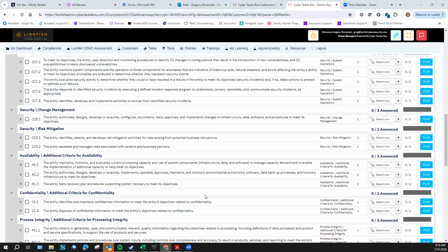So that is a lot of paperwork that goes into this, where you have to invite people to the change control meeting. You have to have the change control meeting. You have to go over the change controls. You have to have them approved. You have to schedule them. And then you might even have to communicate out to the company what changes you're making.